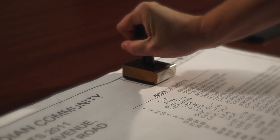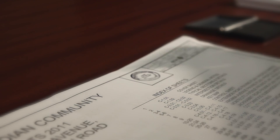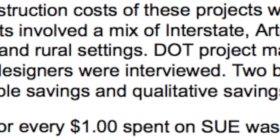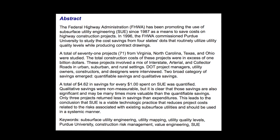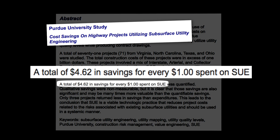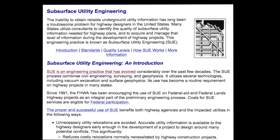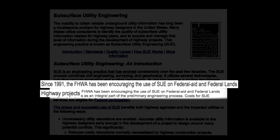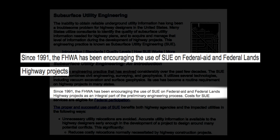Subsurface utility engineering is a proven process. Slight adjustments in design can produce significant cost savings by reducing or eliminating utility relocations. The FHWA has been encouraging the use of SUE on all federal aid and federal lands highway projects.